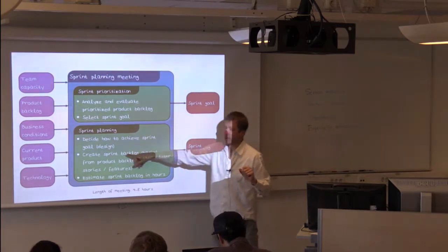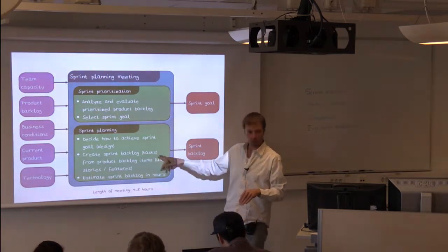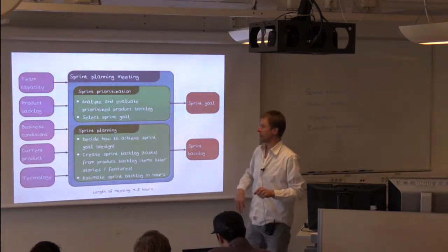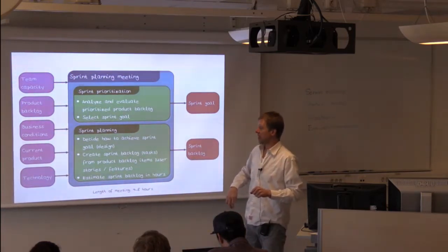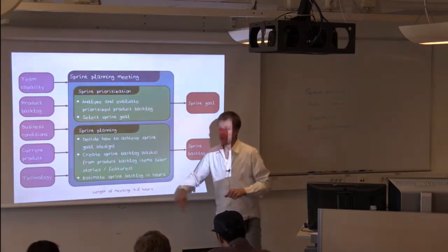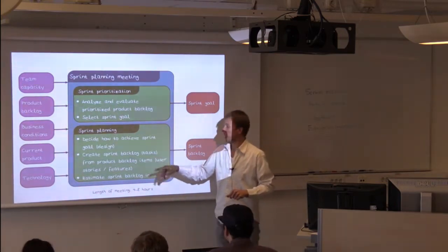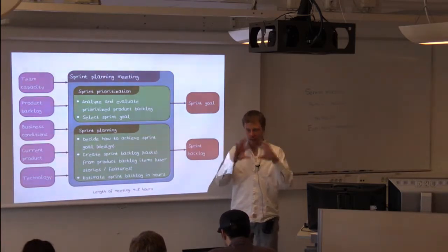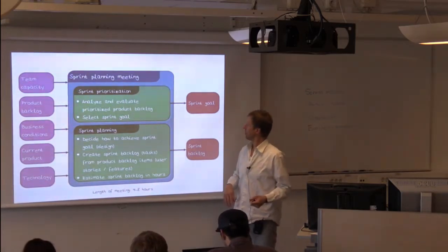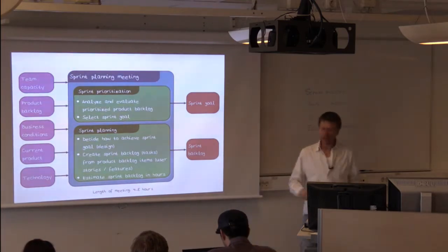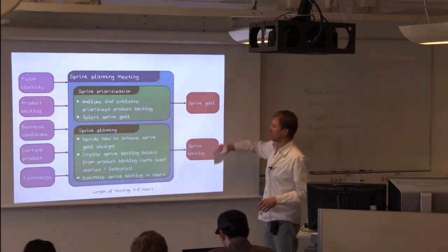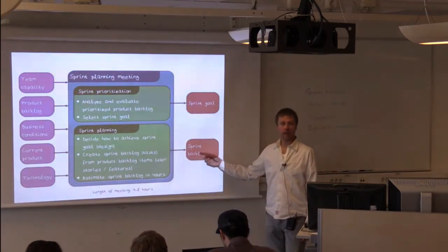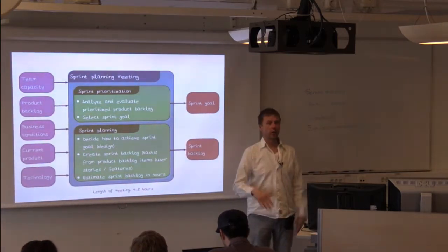These are the technical things associated with a feature, and we'll see examples of this. And these technical tasks end up on something called the sprint backlog. And the team then tries to estimate how long this is going to take us. This is a little bit complicated, and I think we'll get to that, the estimation and planning. So essentially, if we forget about this, you don't need to worry about that. The output of the sprint planning meeting is a sprint backlog. It's a bunch of tasks that you're going to do in the next iteration.